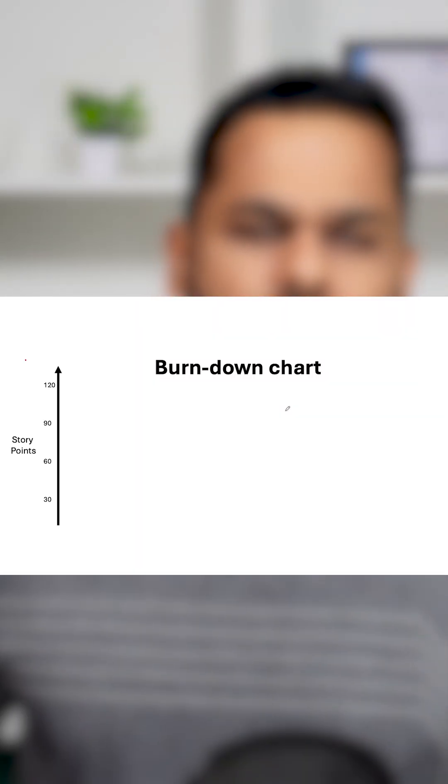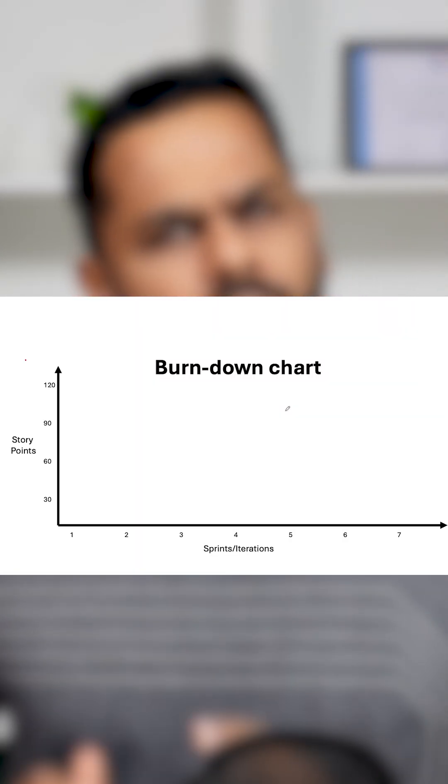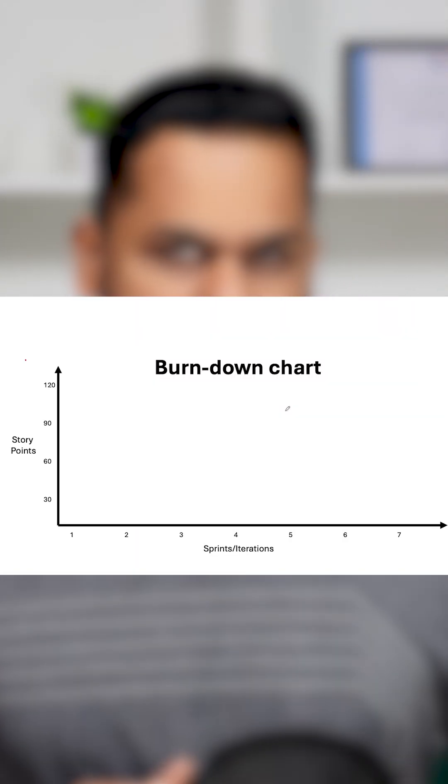Whenever you want to create a burndown chart, you will start with story points on the y-axis and sprints or iterations on the x-axis. We will try to keep a track on iteration by iteration how many story points we are able to complete.